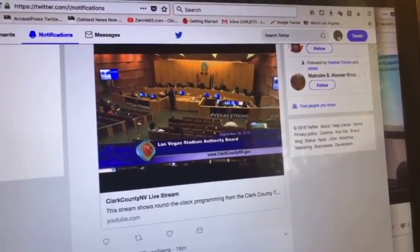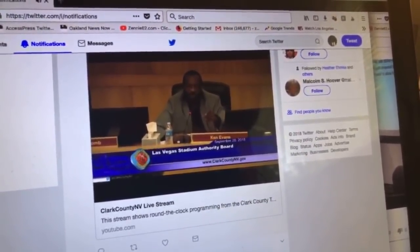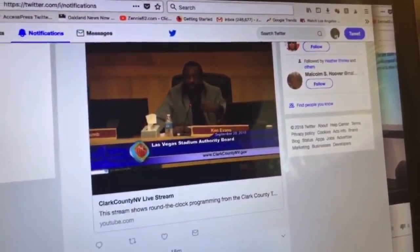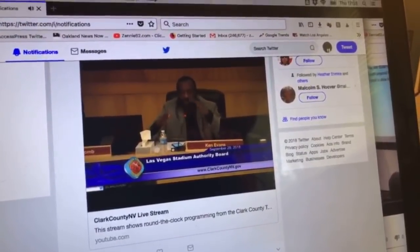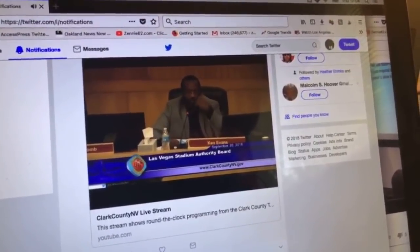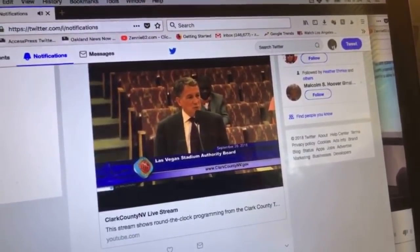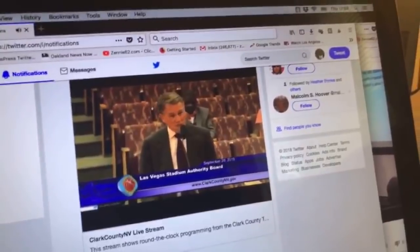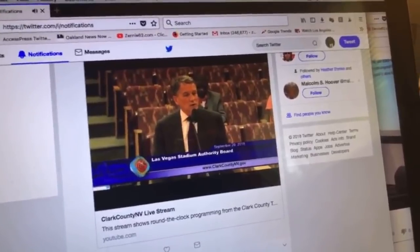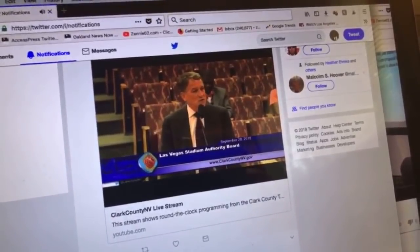And Ken Evans for the record. You already answered the question, because I was wondering about the concrete situation. You're going to ask it again to see if my answer is consistent? No, not at all. Just to say thank you, because I was wondering about the concrete situation, but it's not the actual concrete placement. It's the rebar fabrication, it sounds like, before you even pour. Yeah, that's really what's driving the delay in the concrete. Look, they have a batch plant on site. We're manufacturing our own concrete on site, and we're not subject to over-the-road trucking problems or delivery problems. And it's not the concrete itself, but in order to pour concrete, as Mr. Hill would know probably better than I, there's an awful lot of preparatory work.